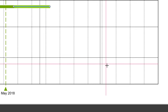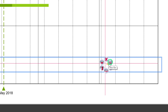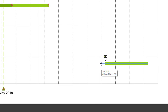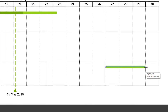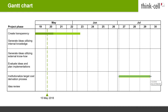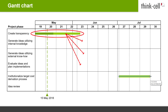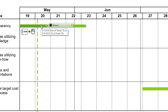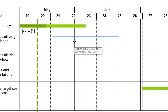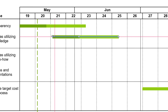Insert a new bar into your Gantt by right-clicking into a row and selecting New Bar from the context menu. Adjust the start and end date of the new bar as described earlier. Another way to quickly fill your Gantt chart with Timeline items is to copy existing bars to other rows. Just select the bar you want to copy, or multi-select by Shift-clicking more bars, then hold down Ctrl and drag the selection to another row. Release and adjust the start and end dates as needed.